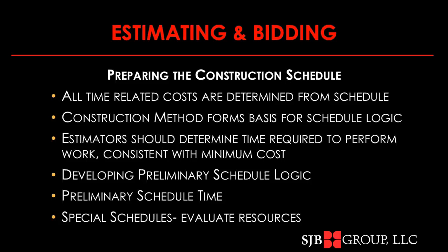In developing the preliminary schedule logic, your bid documents may dictate that certain items have to be completed before others. Your project schedule's start is going to probably be dictated by the award of the contract or perhaps a notice to proceed. And that's the more common one in DOTD world. The completion date and the number of days may be either working days or calendar days. In Louisiana, we account for adverse weather days, and your specifications may help you.